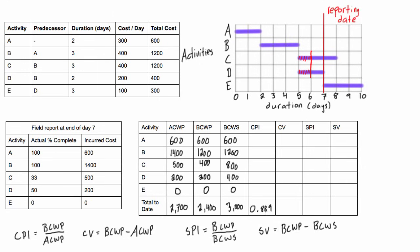Cost variance (CV) equals BCWP minus ACWP: 2,400 minus 2,700 gives a value of negative $300. A negative cost variance means the project is over budget. We can see this directly — the actual cost of work performed is $2,700 but the budgeted cost of work performed is $2,400, so we paid $300 more than expected for the work completed.